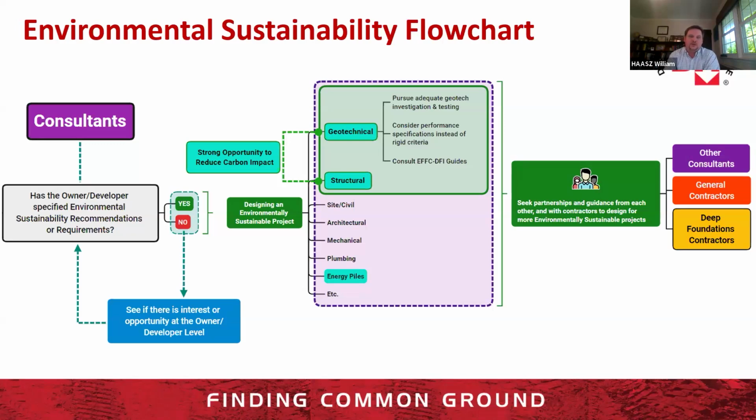Like seeking partnerships and guidance from each other in the consultant world to better understand what might be needed or could be done between site civil, architectural, mechanical, structural, geotechnical, and then obviously energy piles is here as well. Same thing. If you're going to do energy piles, it's very important that that's hashed out in this phase as opposed to later on.